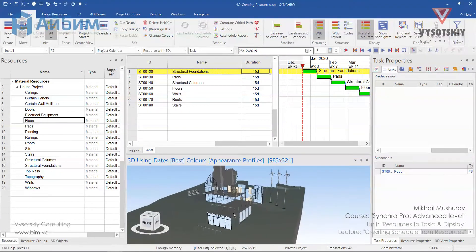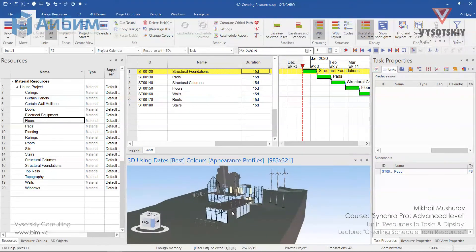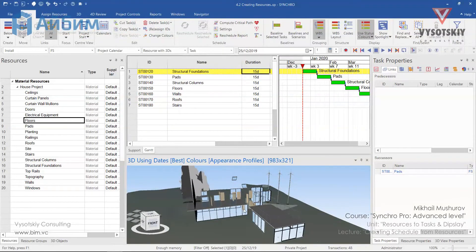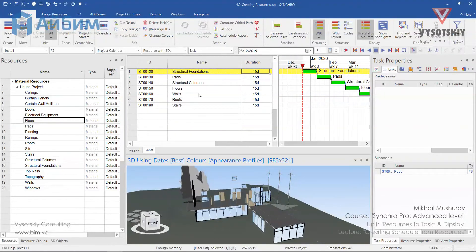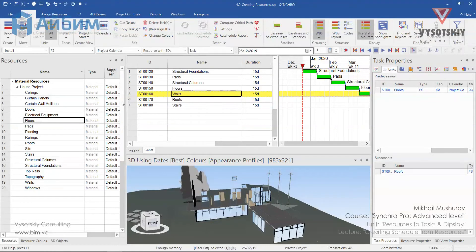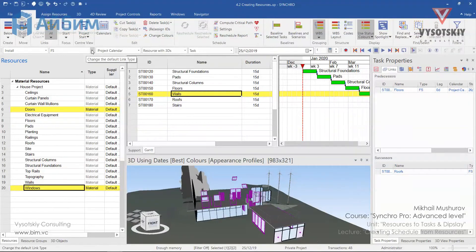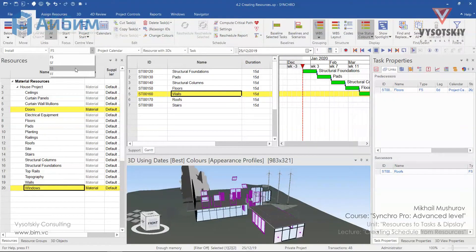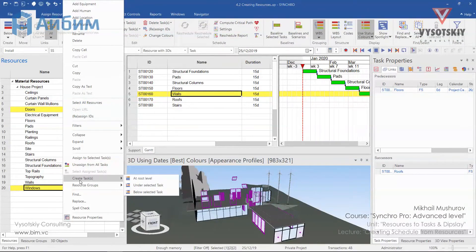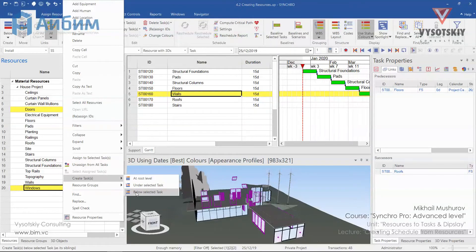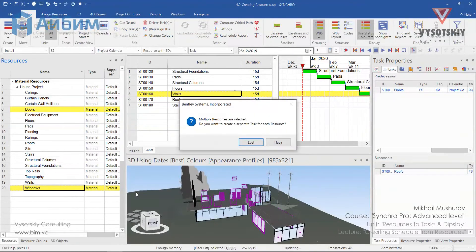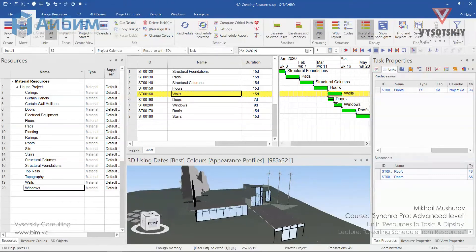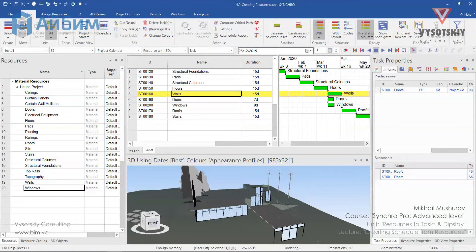We still have unassigned resources in our 3D view, such as doors, windows, settings, ratings and so on. Let's assume we would like to start mounting doors after walls finished. Let's click on the walls and in the resource tab choose doors and windows. Change the type link from finish to start to start to start. Now, make a right click over the resources and select create tasks below selected task. The doors and windows activities have been created below walls.